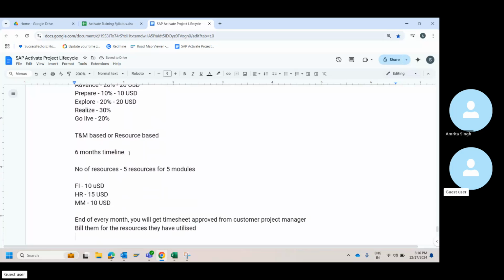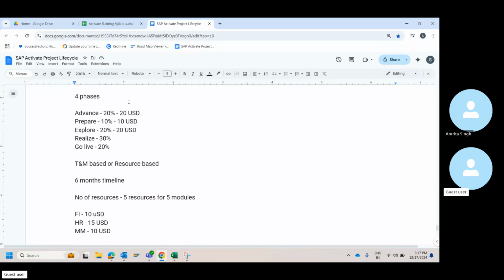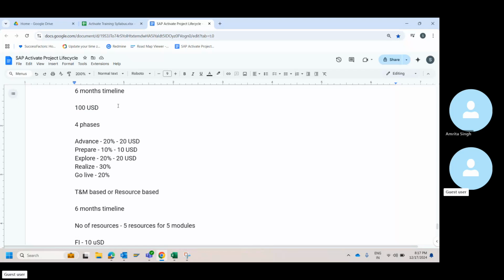Again, here also you will agree on the deliverables. In both the cases, you will agree on deliverables, you will agree on the scope. Everything is the same. However, the change is that this is going to be a fixed price or a lump sum, where for the 6 months you're going to charge them only this amount. Due to unforeseen circumstances, if it is getting extended or they ask for additional scope, then that calls for a change management process. You're going to charge them additionally, or you're going to do it free of cost. It depends on the decision your management is taking.